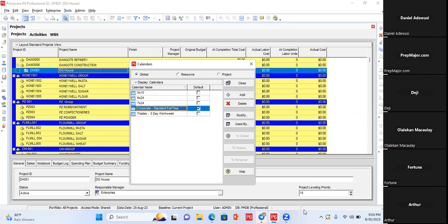Since the manpower is just 1 resource that is left, if the lady was working the other 3 days, what they would have accomplished would have been 3 tasks, but because it's just a guy, I calculated it as 1.5. Well, the guy wouldn't work because the task needs 2 people. Even if you're starting, the guy has no capacity to even start, because they won't let him start. Okay, now I get it. They have to work together.